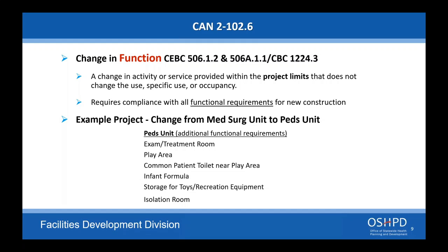So again, it goes back to, you have a space that's open for construction. Is it easier to get in there and fix it now? I would recommend that they do so. Is it required to do so? Again, it goes back to that pass-through question that came in. You have an existing non-compliant condition passing through a space. No, you do not have to correct it.